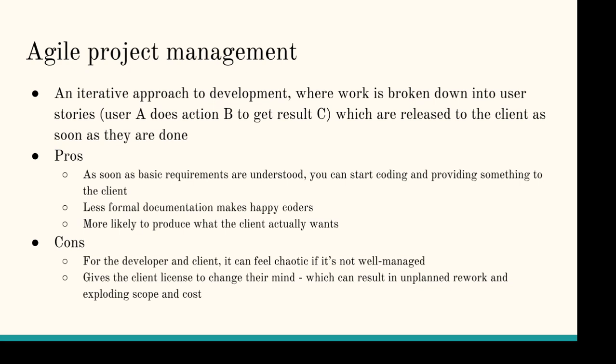So you have to, first of all, have a process in place for when that happens. You have to have done the work of fairly good estimation of the tasks that are already on the table. Okay? So you can show the client, these are the things that you've already said you wanted, and we've estimated these things, and this is how long it's going to take us, and this is when you said you wanted it by.